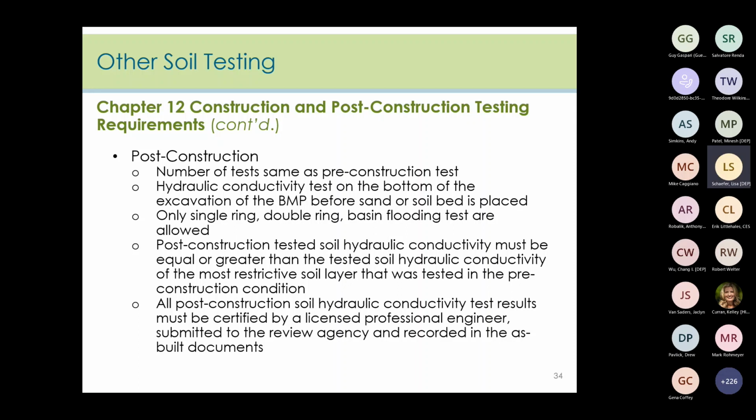The number of soil hydraulic conductivity tests must follow the same requirements as for pre-construction soil hydraulic conductivity tests, and as for the required test depth, the post-construction hydraulic conductivity test must be conducted at the bottom of the excavation of the BMP before the sand layer or soil bed is placed into the BMP.